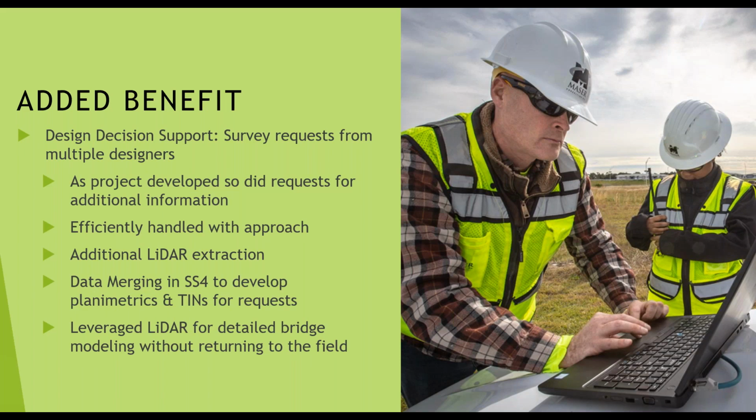So besides using these to actually meet the three-week design schedule, there were several other added benefits using multiple sensor data fusion. Design decision support. If anybody's ever worked on an initial survey for designers, additional requests are going to come from multiple designers after the fact. Maybe they're going to find out something about the site that they didn't currently know, and now they're going to have to adjust their design, which might change survey scopes. So as the project developed, so did requests for additional information. We were able to efficiently handle these with the approach by just doing additional LIDAR extraction.